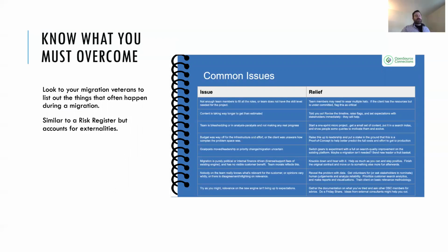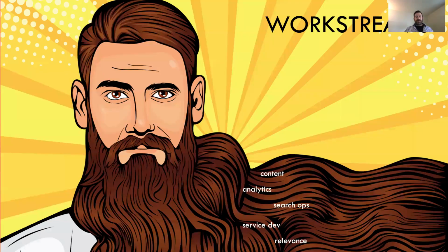So to manage all of these things now, you have this huge plan. You have your basic system that was stood up by like a small Tiger team. You have a list of risks, a list of features, a list of issues that can happen. What do you do? You break it up into work streams. So you have different work streams that are in charge of different areas.